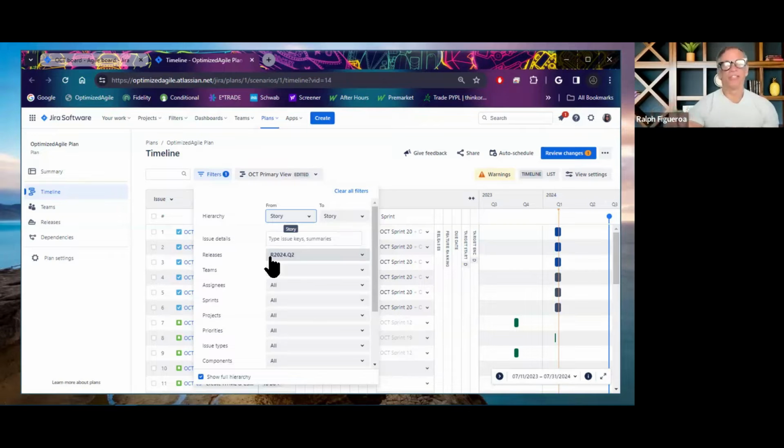That could be bugs, tasks, stories, or any custom issue types that you create out of the story construct. I've worked with organizations that create a dependency issue type. It's a custom issue type because they are integrating everybody into Jira, but this organization has many teams working with other tracking tools, and they're slowly rolling them into Jira. Some teams are using Azure, Version One, Rally, and because Jira does not talk to those other tools, this organization decided to create a dependency issue type.